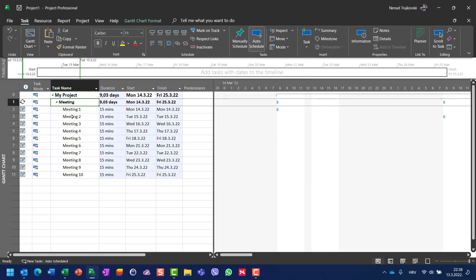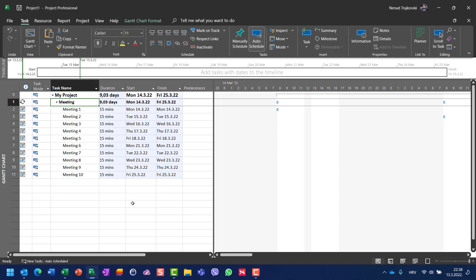Be aware that when you put occurrences and it will last 15 minutes and you have 10 occurrences, then 10 sub-tasks are going to be created with start not earlier constraint, which is going to be explained in some of my next videos. Now you will see that each and every of these tasks will last 15 minutes.